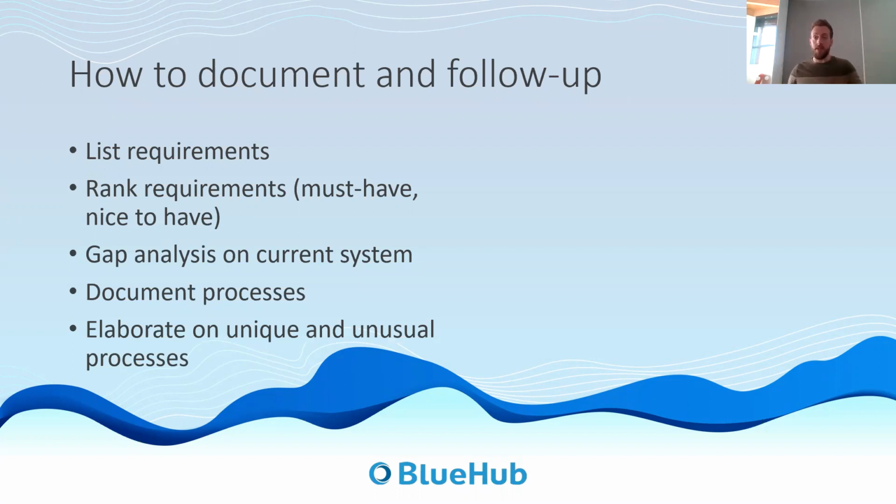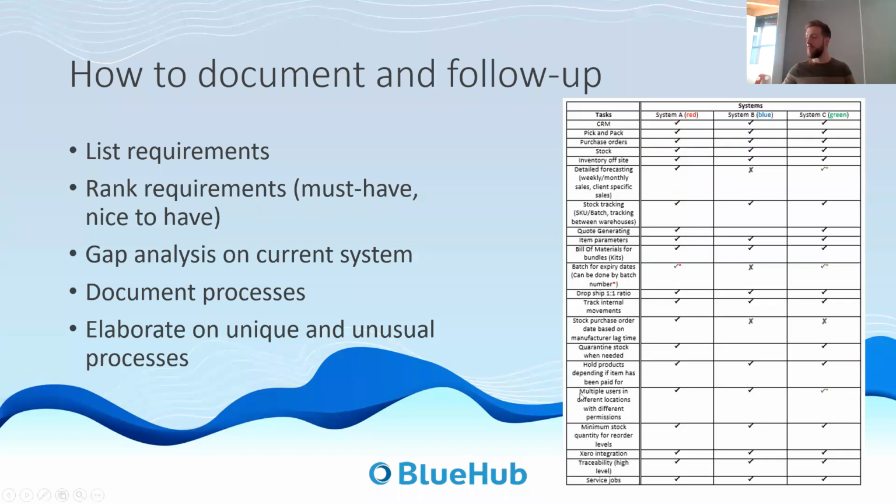Gap analysis on their current system. So draw out a chart, let them see what parts their current system covers and doesn't. So if I just pull this up, this is a suitability grid. You can now create this per client. So we're going to put their requirements down this left-hand side. We're then going to take, say, their current systems. This is the final recommendation, but you'd have their current system, what it covers and what it doesn't, and then an explanation next to anything it doesn't cover as to the gap, what needs to be covered if we were to resolve it.